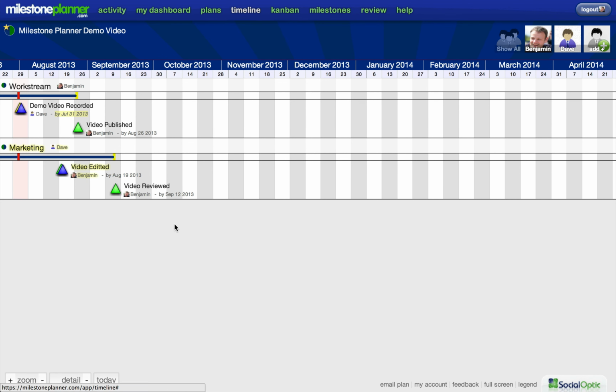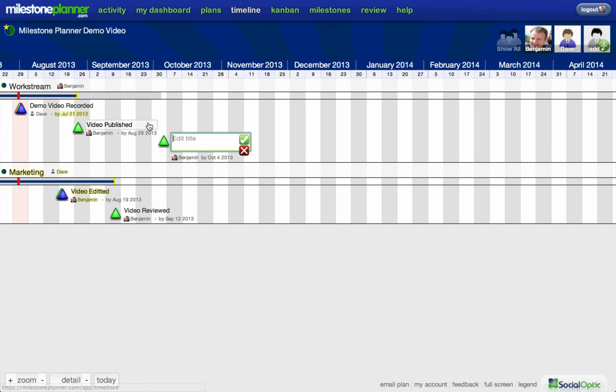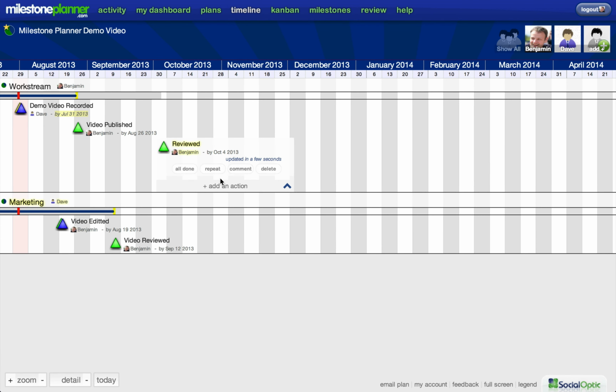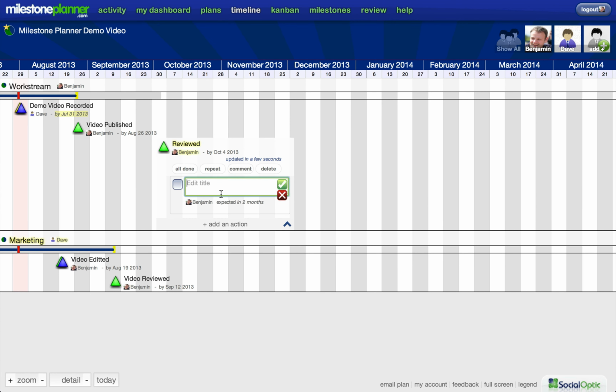You can break milestones down into actions, our version of to-dos or tasks, that are focused on specific things that need to happen to achieve the milestone. Click on the milestone to expand it, then click to add an action or multiple actions, and then assign them to people in the team.